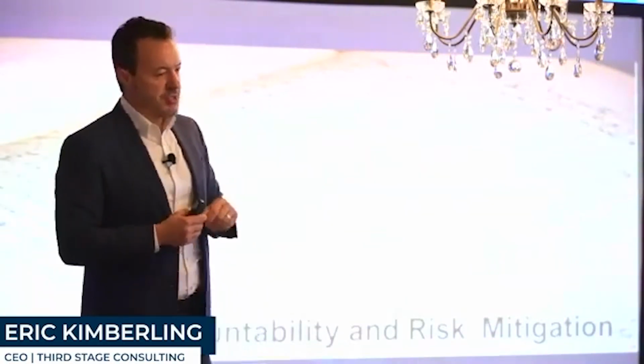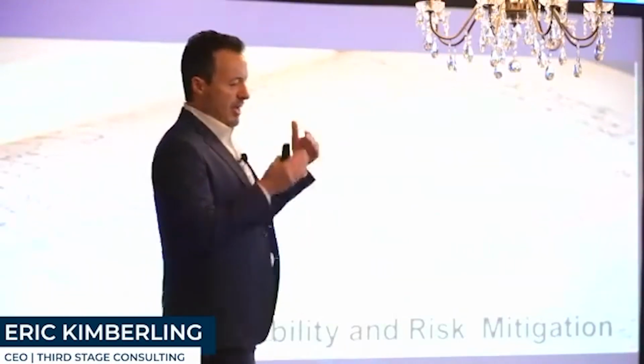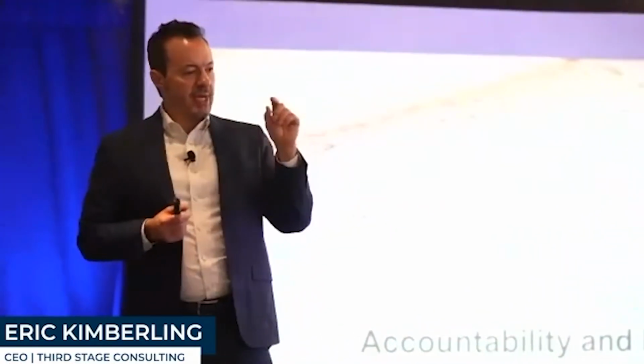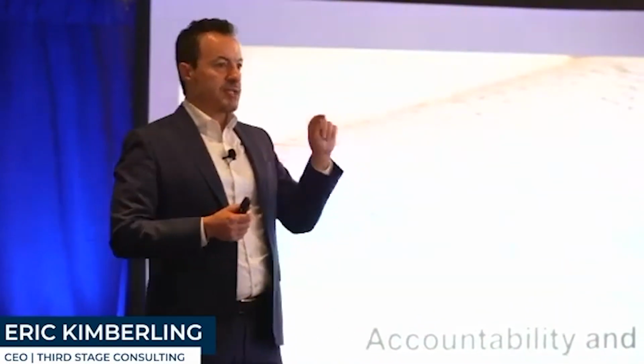The problem with digital transformations too is that risks oftentimes aren't obvious up front. They percolate and just sit there under the surface until you get closer to go live. And the closer you get to go live, the more the stuff starts to bubble up. And by the time it bubbles up, it's too late. That stuff's been brewing for months or years leading up to that point. And that's why a lot of times organizations feel like they just got sideswiped or derailed on their project overnight. It didn't happen overnight. That stuff was percolating over time. So that's why you want to identify those risks early on and start attacking the risk and being deliberate about it.